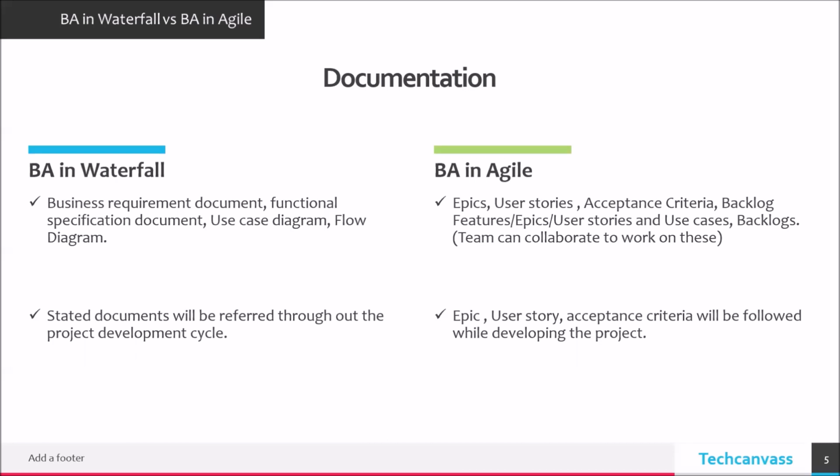In Agile, business analysts' major focus is to groom epics, which are high-level requirements, user stories, which are slices of high-level requirements, add acceptance criteria to user stories, or else work with product owner to groom stories and epics. Development team will follow user stories and work around the acceptance criteria for the development in every sprint. Sometimes client also helps in grooming stories.